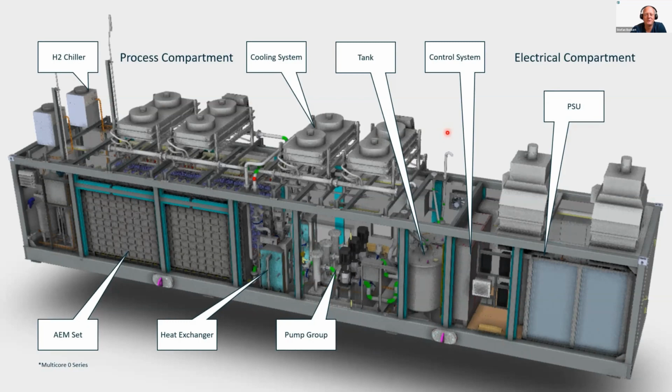A question on commissioning time. So a lot of questions coming in. What is the expected time for the multicore commissioning once everything on the customer side is ready to start? This is a really good question. We learned a lot during our prototyping strings. So of course you need some time. The good thing is we learned a lot of things, but we expect at least, let me say, 2 to 3 weeks for the multicore to have the IO checks and to have everything up and running here. Okay, thanks for that.